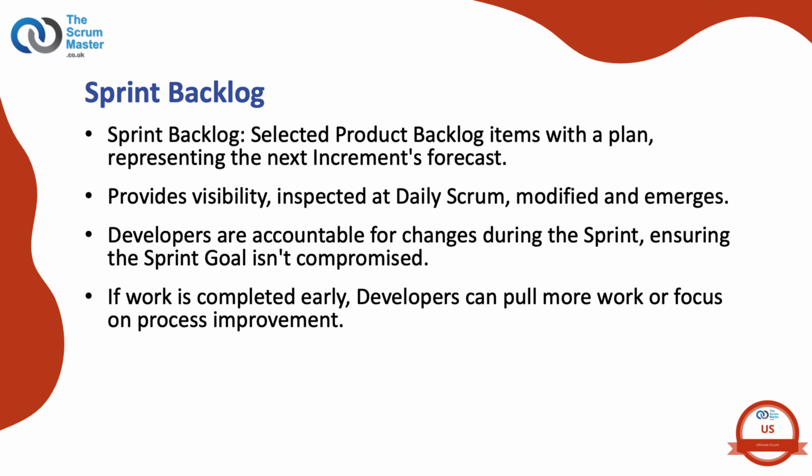Flexibility is often built into a sprint backlog to allow for unpredictability. This may include leaving unallocated time for limited changes to scope, unplanned support requests, or other factors that cannot be predicted fully at sprint planning. The sprint backlog is a short-term, adaptable plan designed to help the developers manage the work inside the sprint. It is a transparent view of the present work planned and in progress.